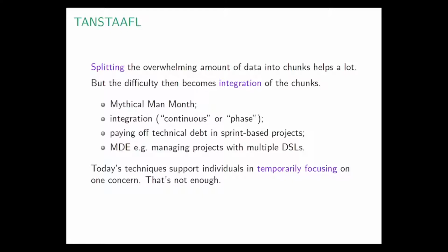There ain't no such thing as a free lunch, is fundamentally what's going on here. So we've made great advances by splitting the overwhelming amount of data and the work related to that data into chunks, but what we've not made so much progress on so far is supporting the integration of these chunks. As far back as Brooks' Mythical Man Month, it was understood that adding people to a late software project might even make it later. Why? Because individual people holding in their mind different collections of the information about a software system nevertheless had to be able to communicate about their different chunks of knowledge in order to be able to get the whole system built, and that is a very difficult, time-consuming, error-prone process.